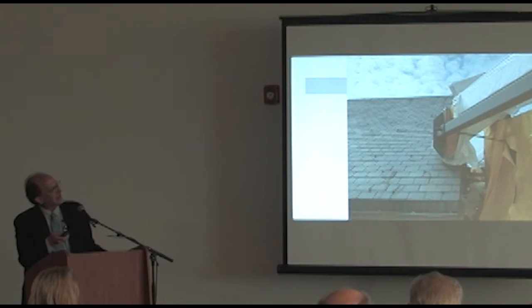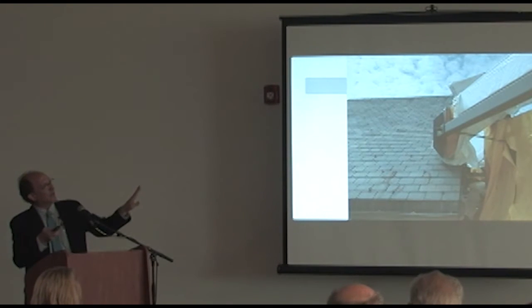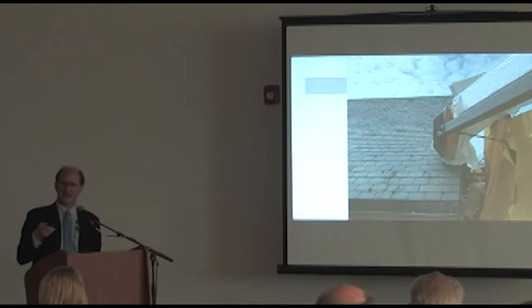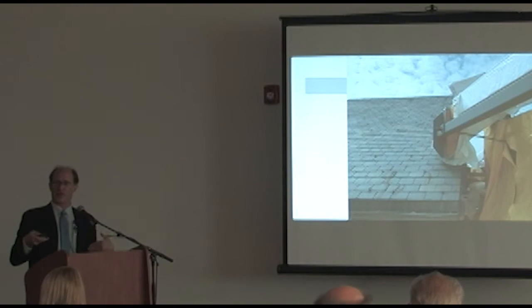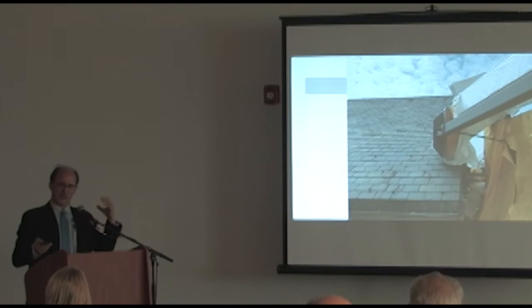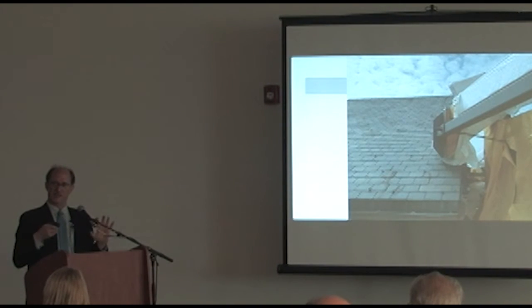And you can see how close it is to the existing roof that we're building over top of. It's kind of interesting. We had to look at all of them in 3D. We needed laser scanning. They scanned all of that so we could make sure we clear all of them, because all of them look the same. But in reality, here is probably the closest point that one comes to the roof. The identical condition on another wing might be 3 feet higher. But the concept allowed me to adjust those while having this absolutely repetitive form in the middle.